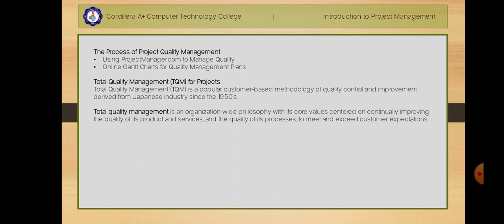In projectmanager.com, you can upload a task list or spreadsheet which is then instantly populated on a timeline. All you need to do is add the duration of each task and assign it. And of course, you can also use our Gantt chart software to quickly build your project from scratch. The online Gantt chart can also provide a great collaborative platform for your team or members. Every task is usually able to link to supporting documents, images and other files, as well as offering a dialogue where team members can talk about the task and resolve any issues that arise.